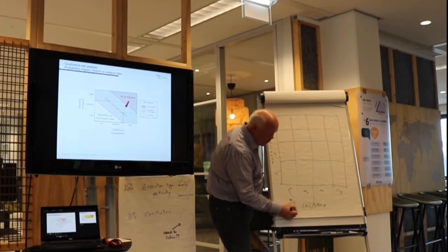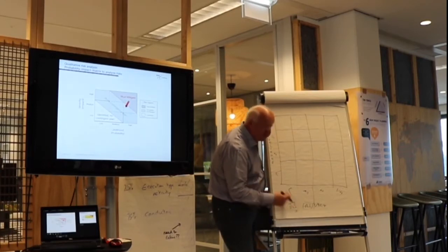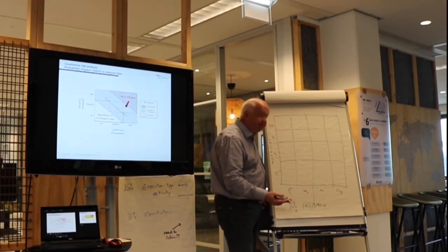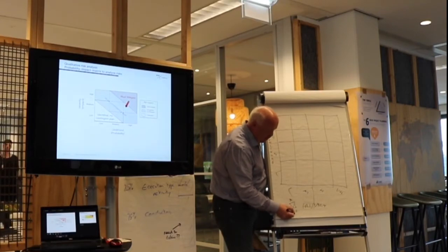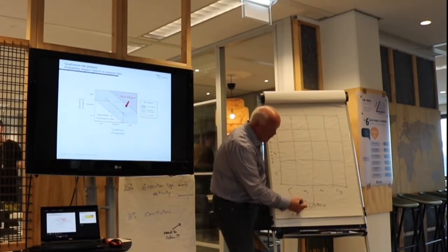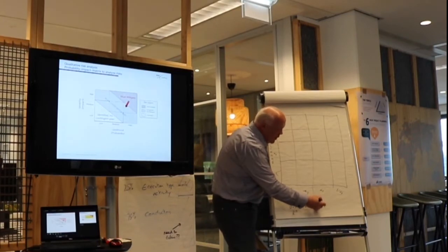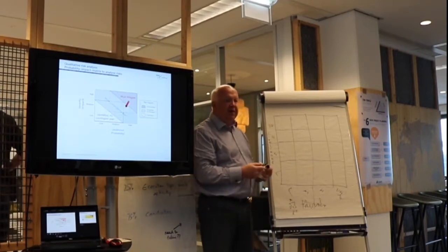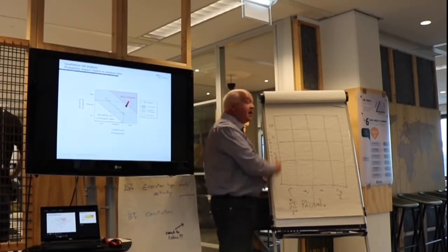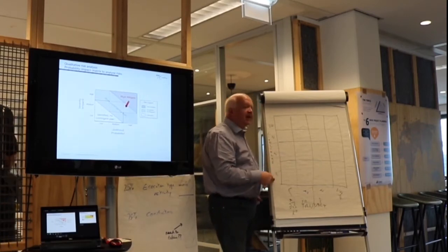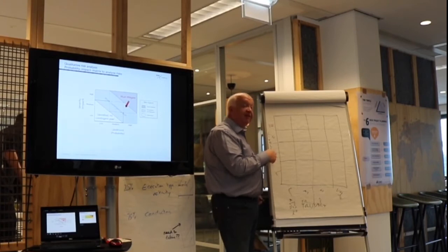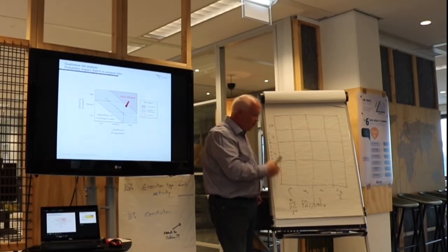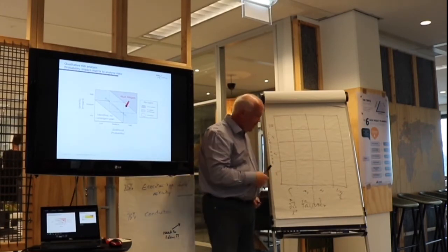So if we said plus or minus 5 to 10%, and this could be plus or minus 10 to 15, 15 to 20, 25 and above, we're getting real high, we've got to deal with something. Yeah, you could quantify it like that. Likelihood could be 1 in a million, 1 in 500,000, or a lot less than that, whatever you feel is relevant.